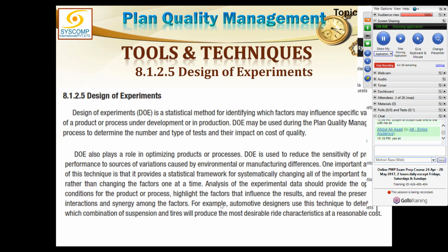Design of experiments is another method, called DOE. It is a statistical method. If a cake can be made in 10 different ways, we must identify the features or the variables in the making of a cake. Say it is the dough which matters, it is the heating which matters, it is the time we cook that matters, and so on and so forth. And maybe the container in which we make the cake. So all these variables would be tested in an experiment.